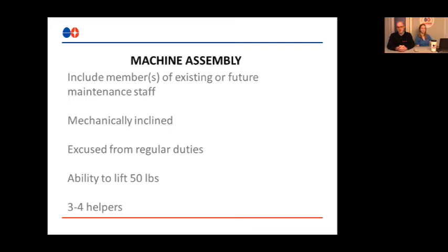If a customer is bringing in maintenance staff, that's great. It gives us and the customer the comfort that these people are already mechanically inclined. That isn't always the case, and we appreciate that. In our experience, we have seen customers use hatchery staff. Sometimes the general contractor provides the staff, or perhaps a third party. So there are many options to provide the labor for the installation.